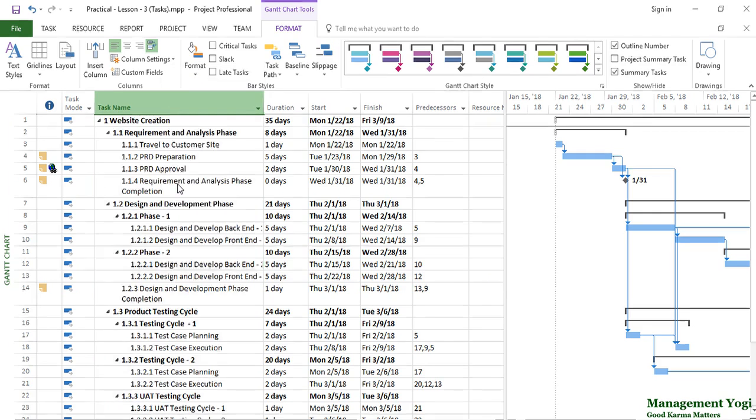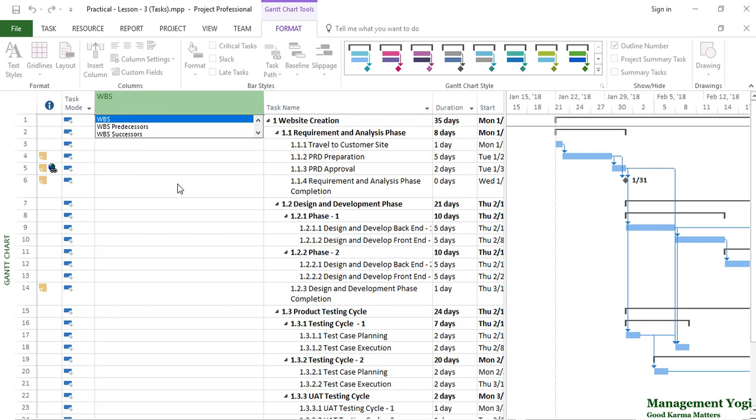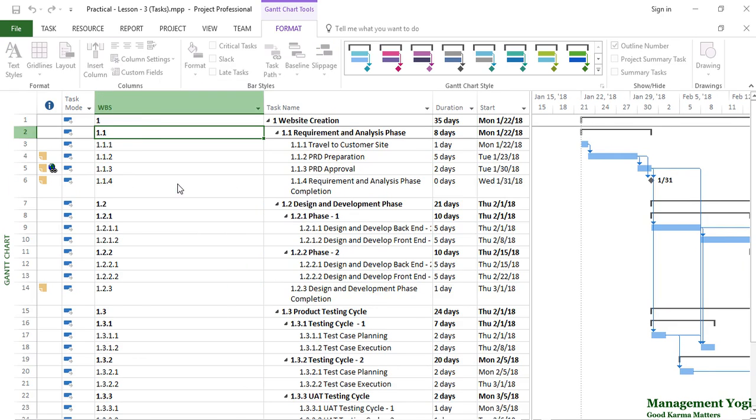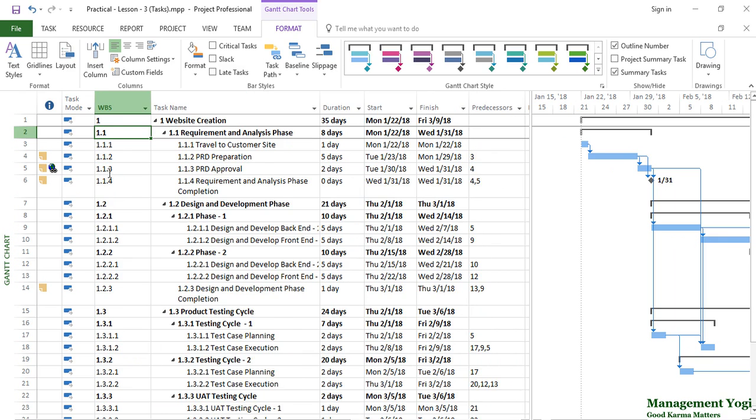I'm going to enable it again, and I'm going to enter an inbuilt field or column here. Type WBS, and the code value or WBS ID for every element is populated in this column. This is another way to see the unique identifier for every element in the work breakdown structure.